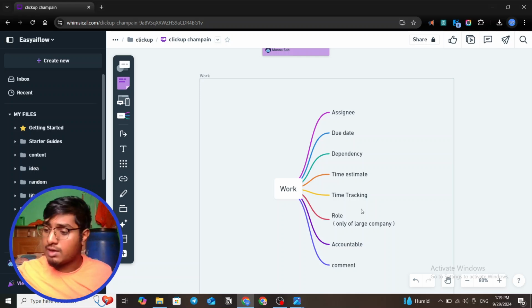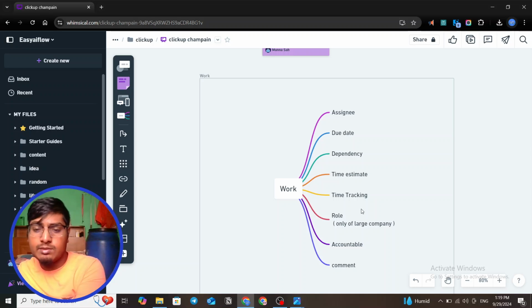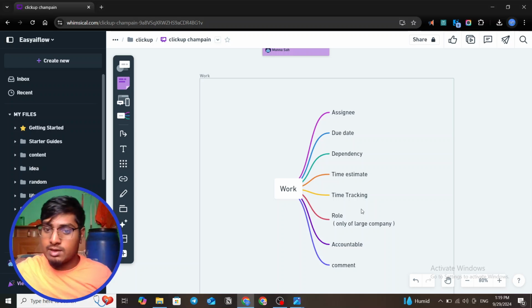So after any project we get, we know it takes 10 hours for scripting, this many hours for this, this many hours for that. Also, you can project that after managing, I have this bandwidth in this month, and I can manage this project, and I can set the deadline.